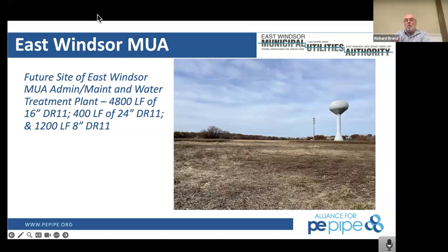Well, it's well worth the investment. In one of our sections, we had a contractor come in and install the water line. Cost us $1.5 million for about a mile of pipe. And that was a mixture of 10-inch, 8-inch, and obviously some 6-inch laterals for our hydrants.